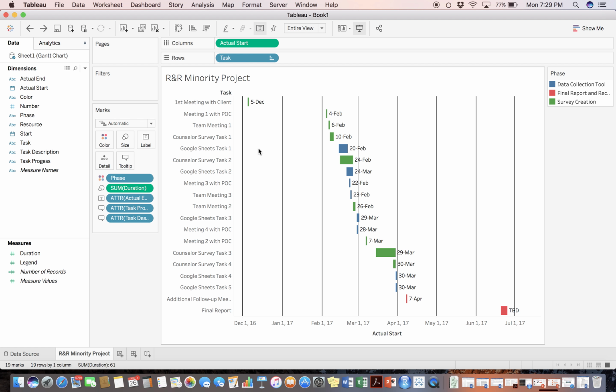We would outline those in the form of this Gantt chart and propose expected times of starting and expected times of ending or completing those key tasks, as well as getting a general description of the tasks themselves, so that we know at each step of the project where we are and how long it's taken to complete each step of that project.